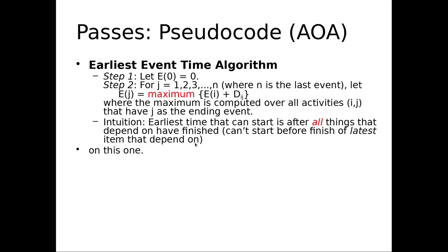So basically there's going to be a forward and backwards pass. The forward pass depends on the maximum: the early start of a node is going to depend on the maximum of the early finishes of the nodes before it. You can't start walking to the university until you've eaten your breakfast. You can't eat your breakfast until the maximum of time for either boiling the water or finishing the shower, right? The early finishes of those will determine the early start of eating your breakfast.